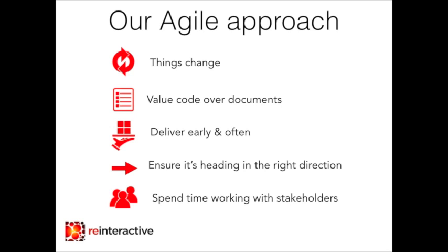And we want to spend a lot of time working with stakeholders throughout the whole process. We don't want to do a requirements analysis stage at the front. We want to do it as we're doing the actual development. When we come to develop a feature, that is the best time to find out exactly what the stakeholder is needing, and not at some far off time in the past. And we want the software developer to be doing that requirements analysis, not some other individual whose sole job is to gather requirements. It's best if the requirements analysis is done by the actual person doing the implementation.